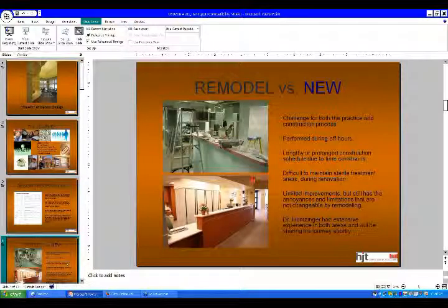If you buy an old building that you want to renovate, or you buy an existing practice you want to renovate, certainly it comes with a bundle of headaches and challenges too. You want to stay in practice, and everything needs to be kept clean and constantly protected from dust. The work may only be doable after hours and over the weekends, and those come with a premium price.